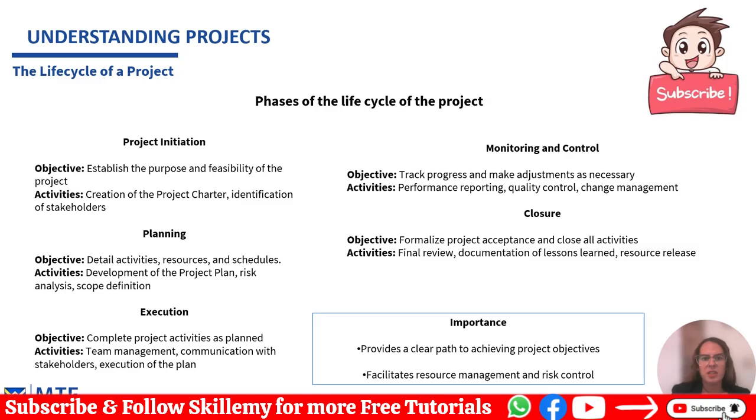In phase 1, the project initiation, the main objective is to establish the purpose and the feasibility of the project. Here we focus on answering some key questions, like, for example, why is this project necessary? What is its purpose? Is it feasible within the given constraints? Activities in this phase include creating the project charter, which is a document that outlines the project's purpose, the scope, and the key stakeholders. We also have to identify the main stakeholders, or the people who will be directly or indirectly affected by the project. So this phase sets a clear direction and gains support for the project before moving into detailed planning.